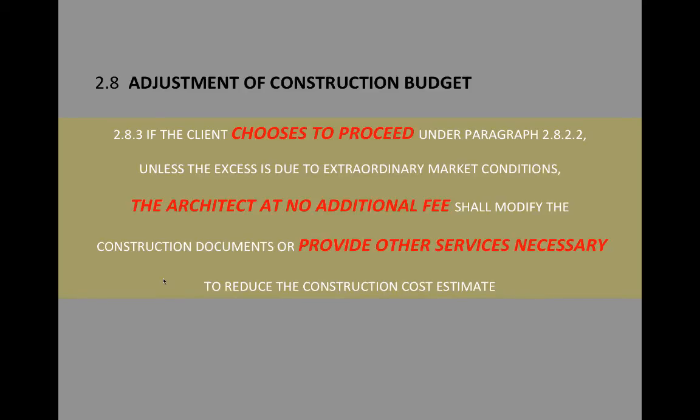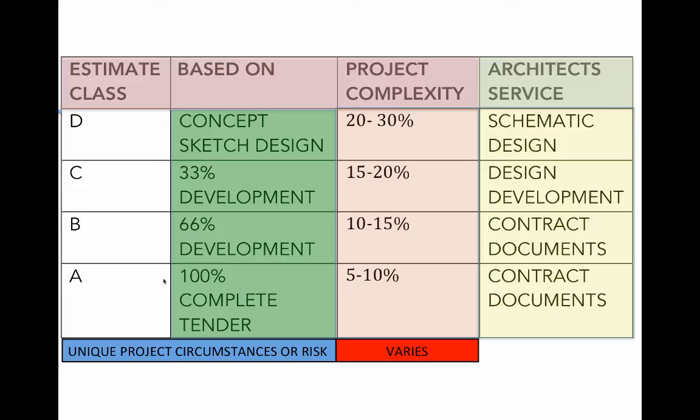We never thought we would actually be over budget, but we were over budget with the construction manager. So we ended up putting in four or five months of just redrawing and bringing things down to make it work. So the budget is a very, very serious responsibility, in the sense that we have to agree to it. We have responsibilities for it in terms of monitoring it and ensuring that the client gets their project for the budget that we have agreed to.